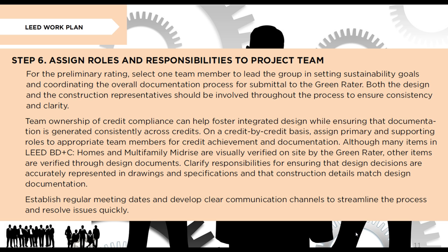On a credit-by-credit basis, assign primary and supporting roles to appropriate team members for credit achievement and documentation. Although many items in LEED BD+C Homes and Multifamily Mid-rise are visually verified on site by the Green Rater, other items are verified through design documents. Clarify responsibilities for ensuring that design decisions are accurately represented in drawings and specifications, and that construction details match design documentation. Establish regular meeting dates and develop clear communication channels to streamline the process and resolve issues quickly.